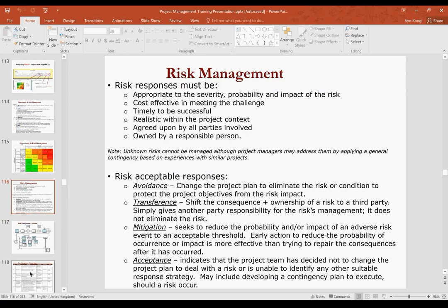Mitigation. You're trying to reduce the probability or the impact. Like I said, one of the things you can do is to speak to the secretary of the EA or the PA or the mayor of London Borough of Bexley to say, can I look at the diary? When is it free for Madam Mayor? What you're trying to do is, the risk is still there, but you're reducing the impact by saying, okay, we can do 2 hours to install this. We give it back to her. Then we use another 2 hours to install what we want to install.